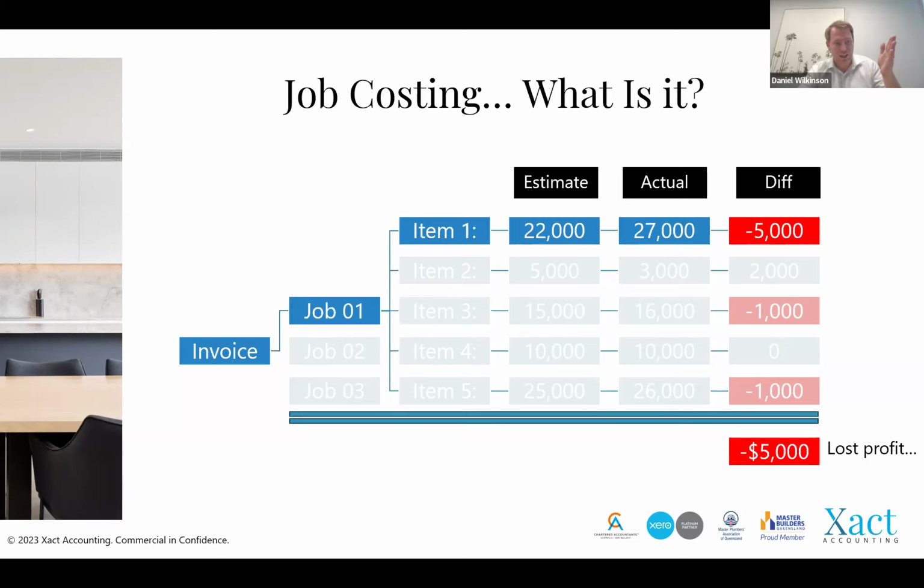So if you can get into a weekly, monthly cadence, and monthly at a minimum, if not weekly, fortnightly, this is that whole concept around defending the margin. Every single invoice that comes in via COGS, or every wage cost that comes in via COGS, I want to see it allocated against an item. So in this instance here, invoices come in, your bookkeeper or yourself, could be your better half, whoever it is, comes in and mashes the invoice in. This here should be a bit of a red flag, going, hang on, why are we giving this money away?